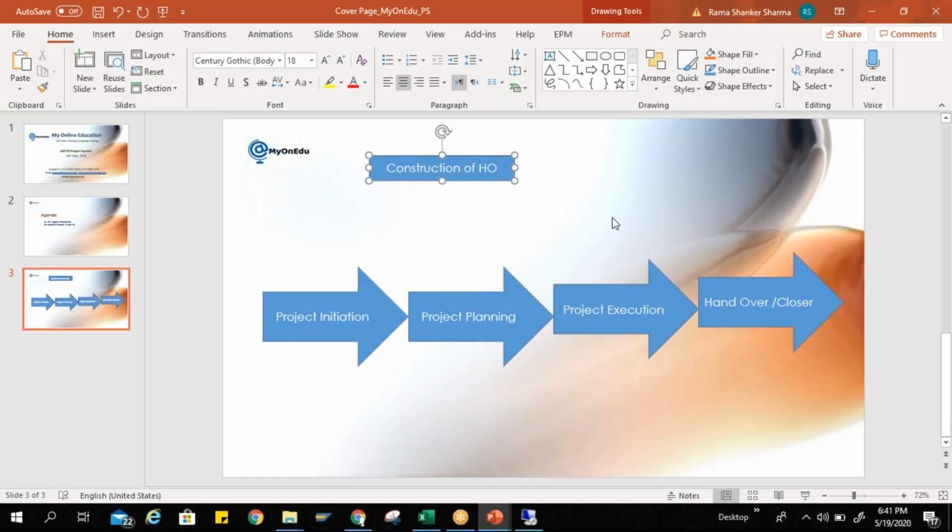It's the simplest master data in PS, the primary one. Here we can divide our requirement into small work packages, the work breakdown structure, WBS. So here we are structuring our work, breaking down our work. We can prepare the WBS, and it will become the basis to prepare or manage other things like quantity, progress, cost, revenue, dates, scheduling, everything. So first is the header, which is my project definition, and second is the WBS.